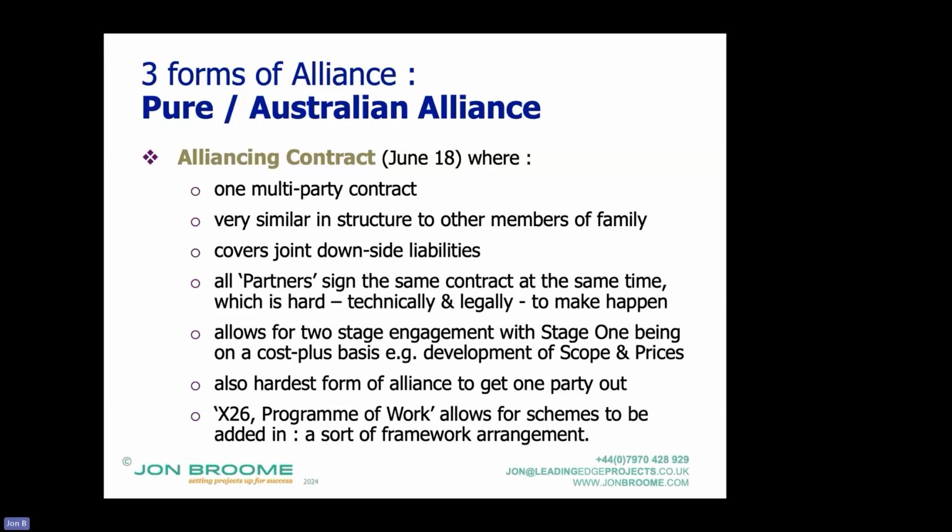So that when a problem occurs, the emphasis is on how do we resolve it, not how do I say it's your fault and let's have an argument about how much extra. What that implies is that the original budget has some monies in it for risk, because we know some of this stuff will occur, but there's not going to be an adjustment for that budget.